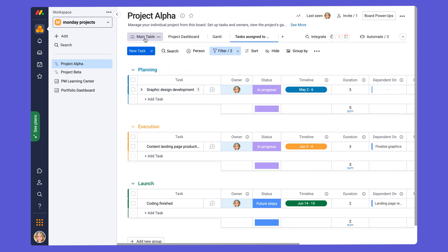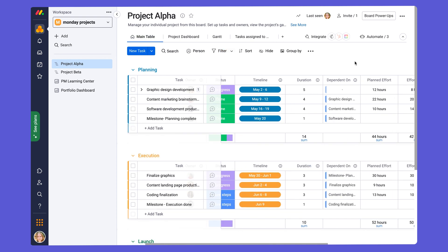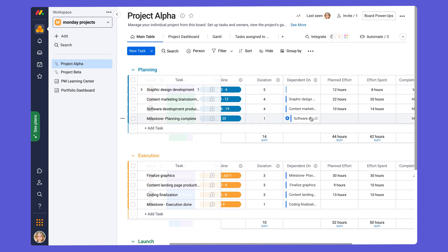Let's go back to our main table board. So let's take a look at our dependency column. This is where you can set up dependencies between your tasks. This column works with automations to ensure that when timeline changes for one task, the dependent task timeline also changes. We will see our dependencies come to life when we look at our Gantt chart in chapter three.